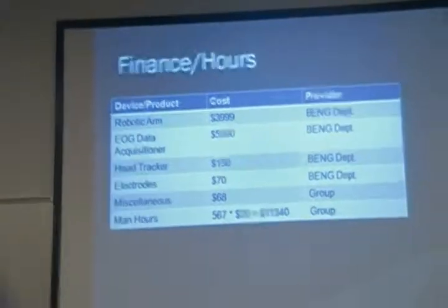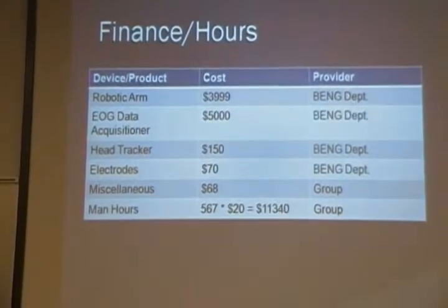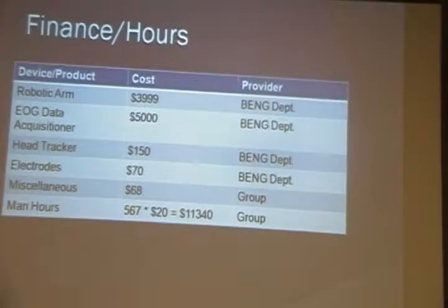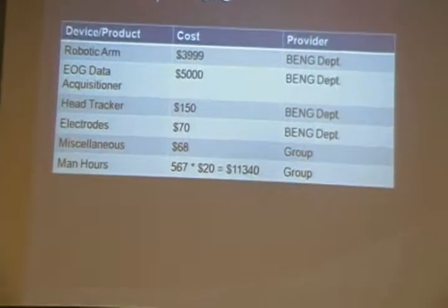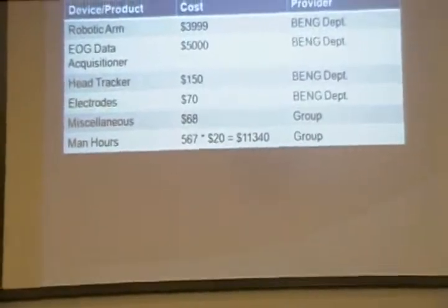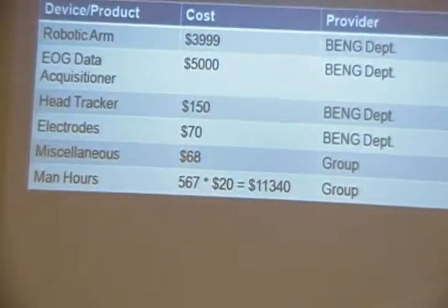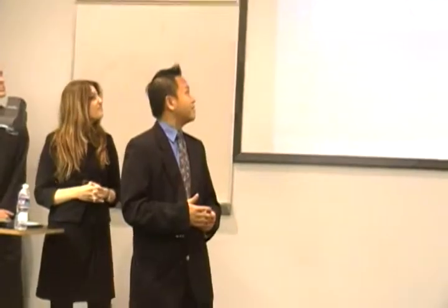Here are our man hours and finances. Most materials for this project were provided by the bioengineering department — the robotic arm, the bioradio, and the head tracker, which was the most expensive part. We also spent money on some other items. As a group, we worked 567 hours, which at a loaded rate came out to about $11,000. The total expense of this project is around $20,000. Regarding work division, me and Tony were responsible for the EOG signal and head tracker inputs, while Joao was responsible for data integration and the robotic arm. We also did a lot of work together as a group. Here are our references, and we are open for questions.